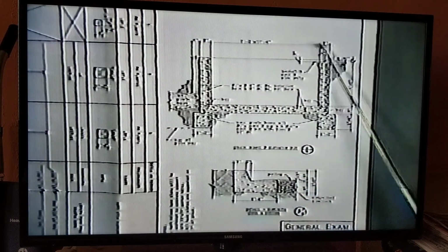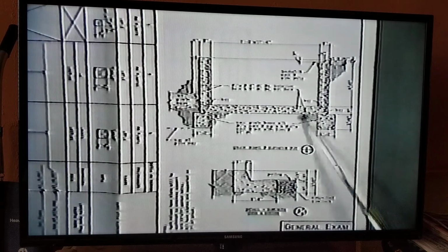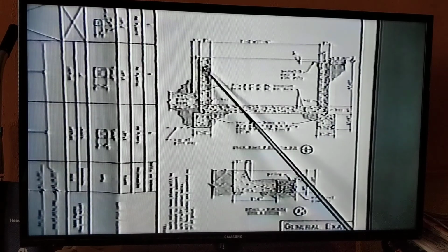And so if we needed to find out the volume of concrete in this pit, you can refer to your CRAM workbook to work this particular problem out. It's also given to you as one of the problems in your sample test here. But the simplest way to find out the volume of a shape like this is to take the exterior measurements, add 8 inches and 8 inches to each of these two measurements. Take the exterior measurements all the way around to the bottom, all the way around, and multiply them all together.